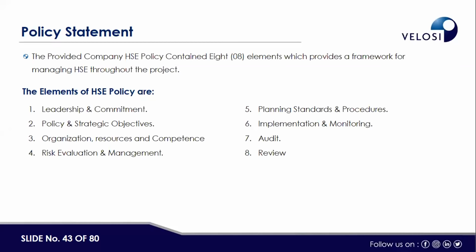In the previous slide, I told you that in the structure we have to see how we are monitoring the implementation of the EMP, and then how we evaluate the implementation of the EMP. Auditing and monitoring, all these are the tools for the monitoring and the implementation of the EMP. And then the review. The review is normally on an annual basis, but sometimes if there is a major change in the process, or a major change in the project activity, then we have to review the EMP again, and we have to update it as well.